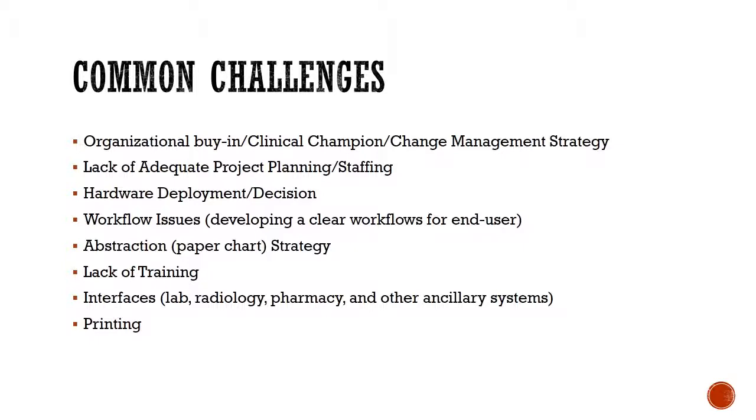We touched on this earlier, workflow issues. This is more where there isn't great communication between whoever is actually building out or customizing your technical solution and whoever has the operational understanding of what's happening in your practice. It's important to develop clear workflows, do that current state analysis, and make sure that everyone is on the same page. Maybe a couple extra meetings to go through Visios, go through workflows, verbalize what you believe is going to be happening, and then actually make sure your leadership is in line with what the expectations are with your technical team.